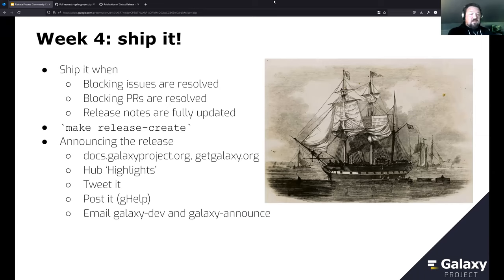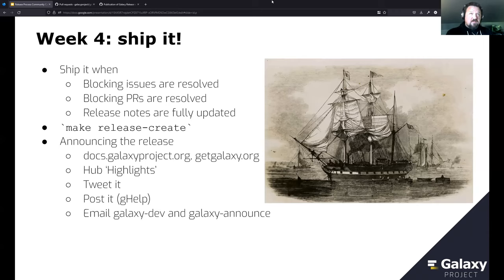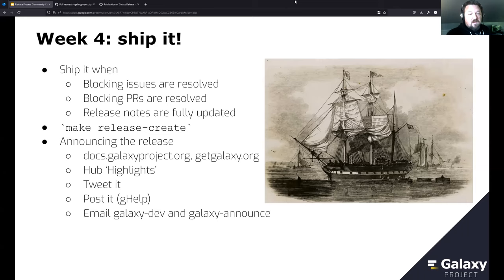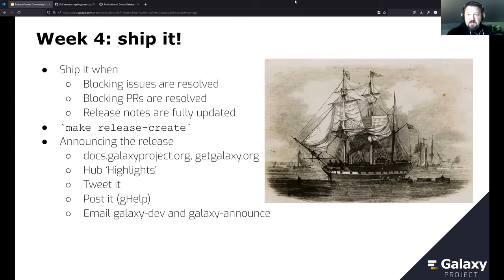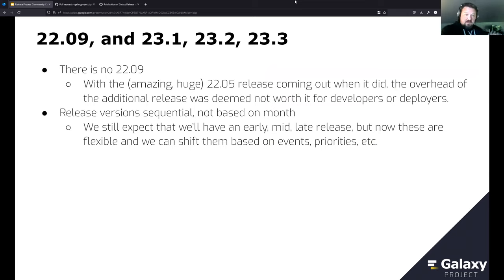In week four we ship it — when all blocking issues are resolved, PRs are resolved, and release notes are fully updated. The release process has a lot of automation: you run make release, make a couple of PRs, and the release is official. Then we announce it — ensuring the release is listed on docs, galaxyproject.org, get.galaxy.org links to the right new release, we make a hub highlight post, tweet it, post it, and email it.